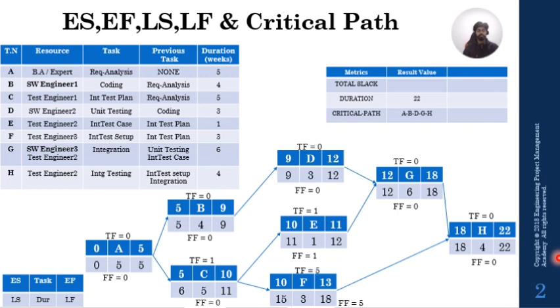But on the contrary, let's say in the same meeting another colleague informs you that one of the colleagues is not available due to an accident or sickness or something like that, for example software engineer 3. Now you immediately go back to your network diagram and see that G is being jeopardized, but in this case the slack you have is 0. You have no freedom. Even if you delay it by 1 day, you are going to put the whole project deadline at risk, the activity of complete development.